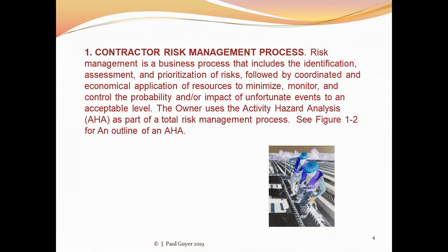So that's kind of the fundamental picture of a contractor risk management process. Identify the hazards, the things that can go wrong, assess those hazards in terms of their likelihood that they will occur, because some things it's not likely they're going to happen very often.